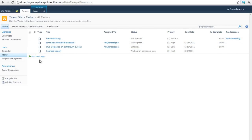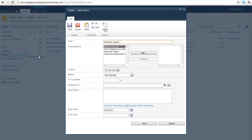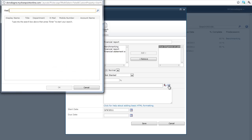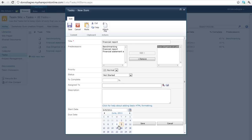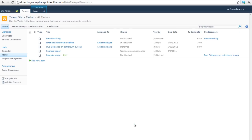You can add a task by clicking here on add new item. Choose the title name of the task and the predecessor so that the project can be organized. You can choose the level of priority, the level of completion, and then you choose the assignee in the address book, the starting date and the due date of the task.